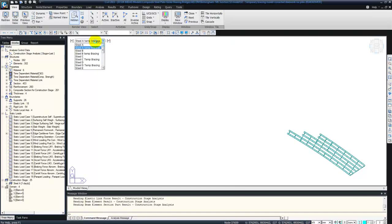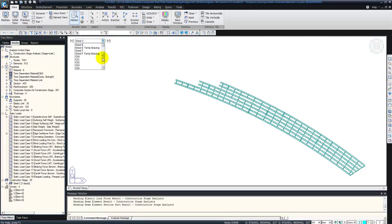Then you have some temporary bracings in place. Then another span comes into picture, and then temporary bracings. So it goes on. The way the construction stages are defined in Midas actually helped us to reduce a lot of time involved in the analysis, and we could edit the construction stages later on very easily, because we had to continuously change the construction sequence